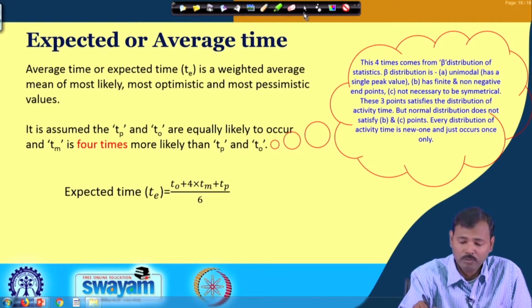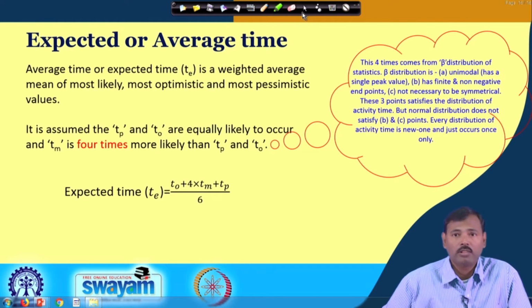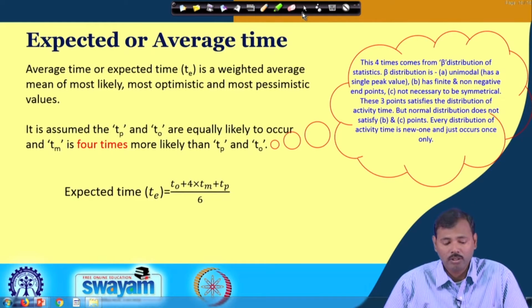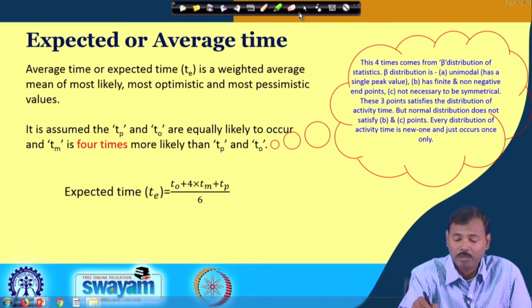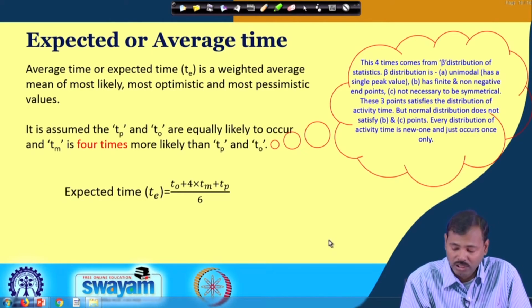Basically, there is debate on accepting this, but if someone moves to the normal distribution, then also the errors coming into these calculations are not significantly high. So, that is why beta distribution, as it is easier to adopt, is adopted, and its applications have been tested by a number of researchers already in this field.